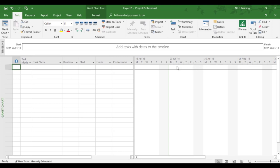Now project calls Monday to Friday working and Saturday and Sunday non-working. So the white is working and the gray is non-working. Now for hours in a day, project by default works eight hours per day. So if we don't customize it correctly and get it to work the way we need it to work for our operational needs, project will never help us and give us the accuracy we need.